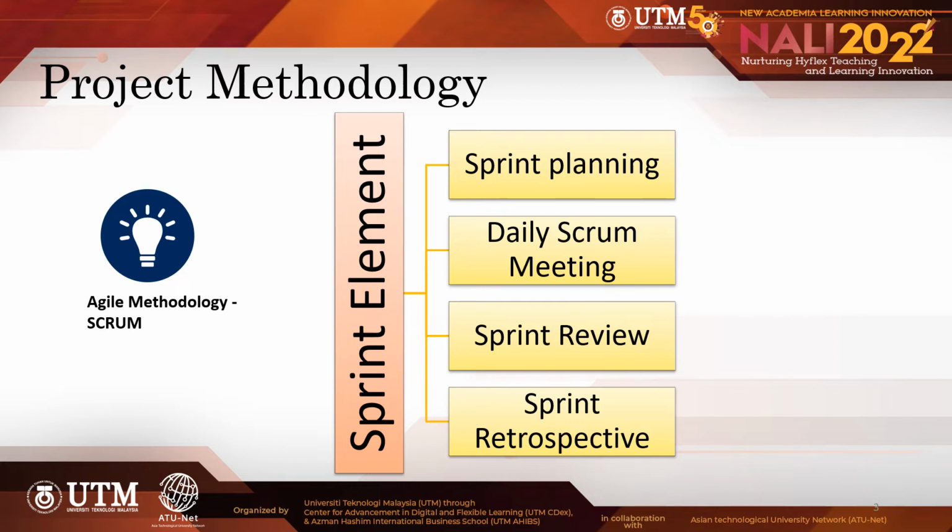2, the daily Scrum meeting. This is a short daily meetup for the software development team to discuss what had been done, what they were planning to do on the meeting day, and what problems occurred since the last meeting. For monitoring purposes, the project manager joined these meetings once in every 2 days.